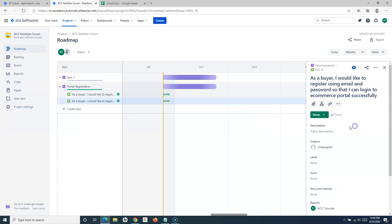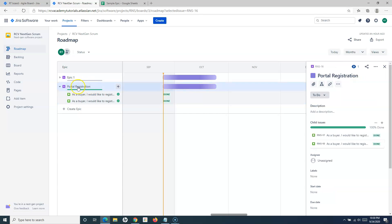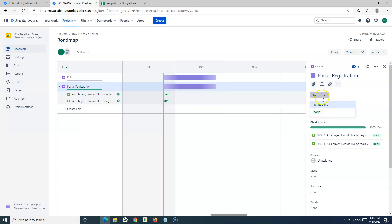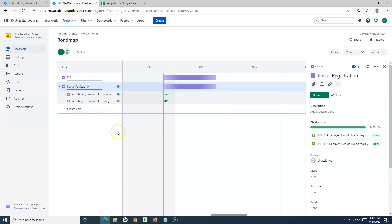Say for example the user stories are marked as done or closed — you will see the progress in the progress bar for the child issues, and you'll see the Portal Registration epic's green bar showing two of two issues done. If you are managing the project, simply click on the Portal Registration epic and manually close it by choosing the status as done or closed from the drop-down. You can see the epic has been marked as done — the green tick is available against the epic in the roadmap.